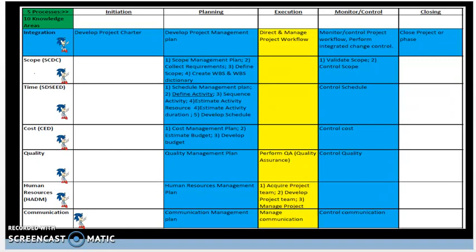Now, scope creep is externally driven by customers who constantly add new features during a validation session or final sign-off. And the gold plating, on the other hand, is internally driven by the project team, typically by a software engineer or analyst or team member who wants to add nice-to-have features on top of the mandatory requirements, resulting in a situation where the team bites off more than it can chew.